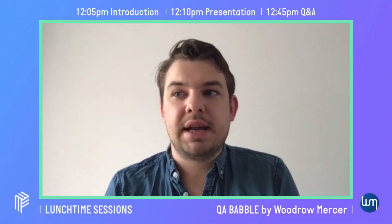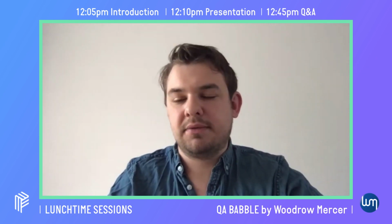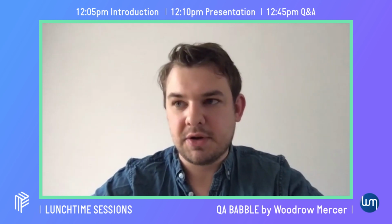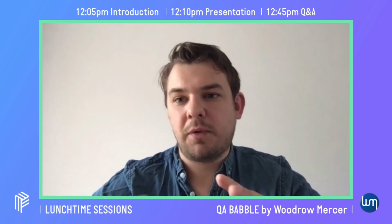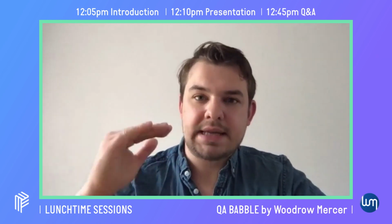So in terms of what our definition of ready was, perhaps if I expand on what that meant. We had things like you couldn't bring it into the sprint unless any supporting tickets were done. I mentioned earlier how we'd think about how we're going to test something. If when we were testing we said, actually, we don't know how we're going to read data from an FTP server or something, we'd say, okay, we need to do a spike to plan how we're going to do that in the test framework. So we'd have a dependent ticket, and the ticket can't be done until all dependent tickets are done. There has to be verifiable acceptance criteria. We had wireframes for all our UI stuff that was done by a UX guy. So it was quite a straightforward checklist of things that had to be there before we would bring it into the sprint.